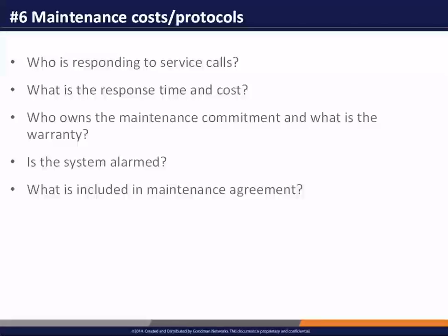Typically, a maintenance agreement will have terms in it that talk about, okay, for X amount of dollars, you get someone that will respond to an alarm, say, next business day or within 48 hours at no additional cost. That might be fine in an office building, but if you have a stadium or a venue where there are critical times and you need a response, let's say within 8 hours or on a weekend, you need to fully understand who's responding and what's the additional cost to you to get that response time.